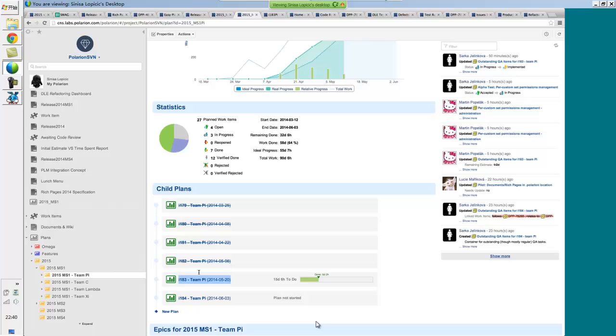We actually implemented this maybe a year and a half ago, and before that we did not have it. We had only code freeze, which in this case is sprint 184, which is used for final test passes, overall release tests, and then shipping and packaging the product. We wanted to do this because we wanted to put a bit more space between the release and actually finalizing the feature. We usually have 2 kinds of feedback pools when we work on a feature, alpha and beta.